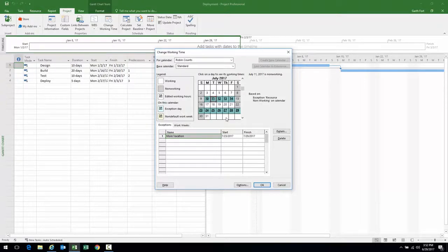There you have it. Those are the two different methods to do it. We demonstrated doing it via the timesheets, and that would be a mechanism where, if your organization is utilizing timesheets, you're utilizing operational activities that are in your timesheets. The team member would submit, somebody would approve, and then the calendar exception is already created. The other mechanism would be if you're not using timesheets, or for some reason your organization does not want to submit the calendar exceptions via the timesheets, you would go ahead and do it utilizing the method I just showed. Check out the resource from the Resource Center, open it in Microsoft Project, make the changes, and then close and save the Enterprise Resource Pool.